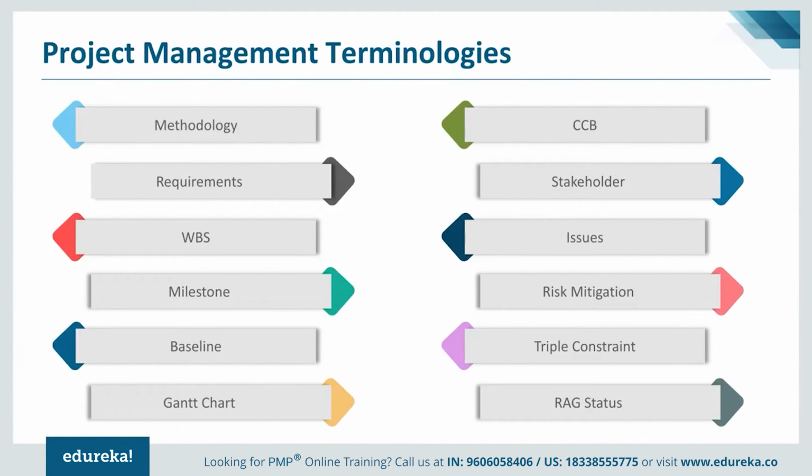So if there is any requirement, we just spoke about requirements. Your team, the project team, will spend a good amount of time talking to the stakeholders. They will use various techniques to gather requirements. And once all that is done, you will document your requirements, and the document is signed off. You take sign off from your customers. Now, if anything changes after that, then it has to go through a change control process, which is already defined.